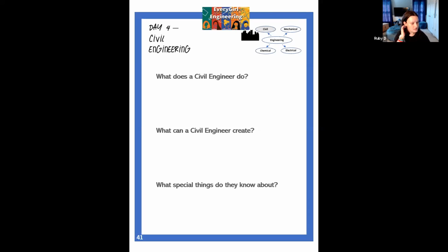So Nicole, how does architecture fit in with civil engineering, and are they similar or different? So civil engineers and architects have to work really closely together. The big college campus project that I worked on was a design build project, which means that the architect company is teamed up with the construction company. And the university says we want to have a project that can have like 1,000 beds, so many offices, this many seats in the dining hall. What design are you guys proposing to build?